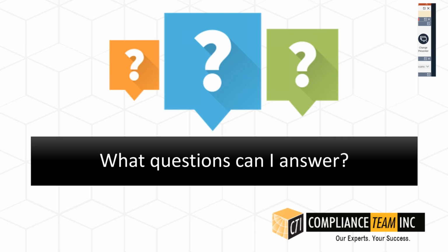I think where I see the most place to struggle is implementing strategies around leveraging your commissioning activities, your FAT, SAT, and getting the most out of your vendors. I see companies a lot enforce standards on the commissioning documentation that is basically the standard of an IOQ. And if you're trying to hold your vendors to IOQ standards, you're basically doubling the work. You're essentially saying we're going to write 2 IOQs instead of writing 1 IOQ. So one area where I see people can have the most improvement with the risk-based approach is to work with the vendors to make sure that the documentation they're providing meets minimum standards, and then leverage that instead of writing a second IOQ, which you're trying to leverage into your qualification documentation.